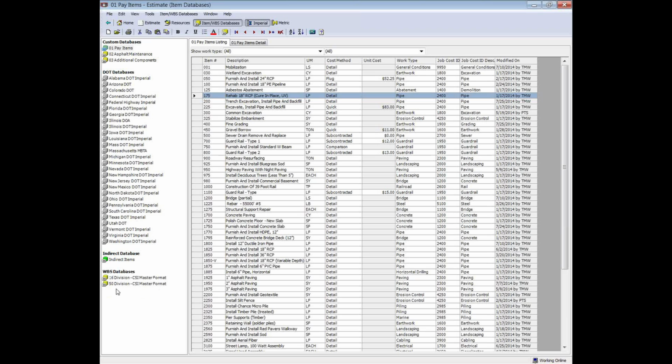And as I mentioned, for examples, I'm using one of the most common, really nigh ubiquitous work breakdown structure systems, the CSI MasterFormat. So that's from the Construction Specifications Institute, and there's a 16-division breakdown that's very common among folks that do WBS. There is also a 50-division version that they're pushing quite aggressively. Most folks are still using 16-division.